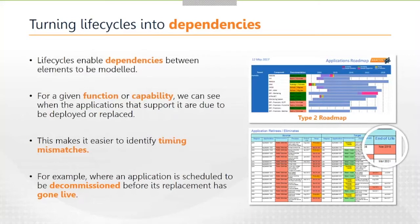Life cycles also enable us to start to understand dependencies. For example, if we're working with a given area of the business — a business line, function, or capability — we can take a look at the applications or processes that support that capability and understand when a legacy application is being decommissioned and when its replacement is coming into service. This allows us to identify timing mismatches. We have an example report generated from Abacus which uses very simple conditional formatting to check whether a replacement application is not going to be ready in time to match the planned decommissioning date of the application it's supposed to replace.